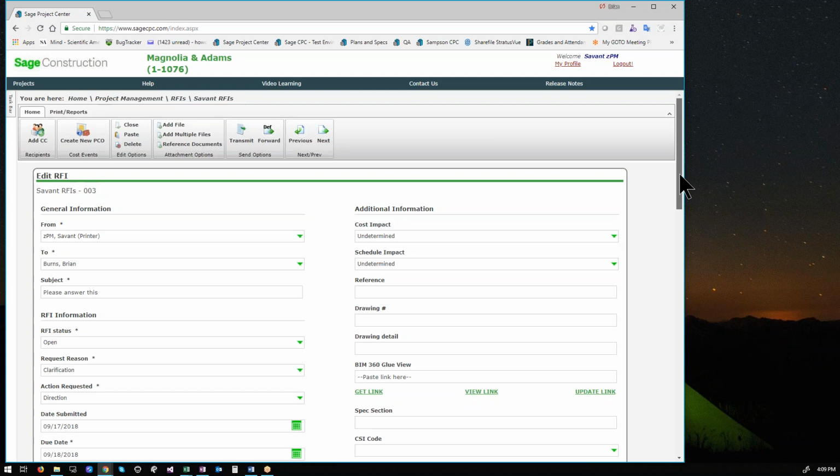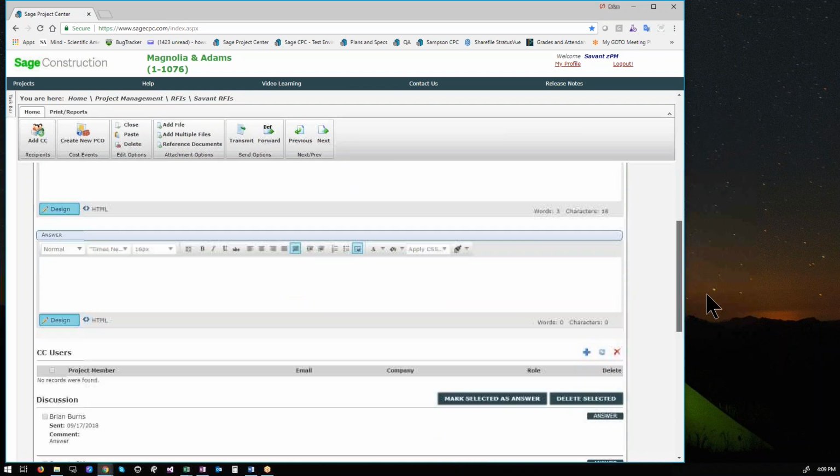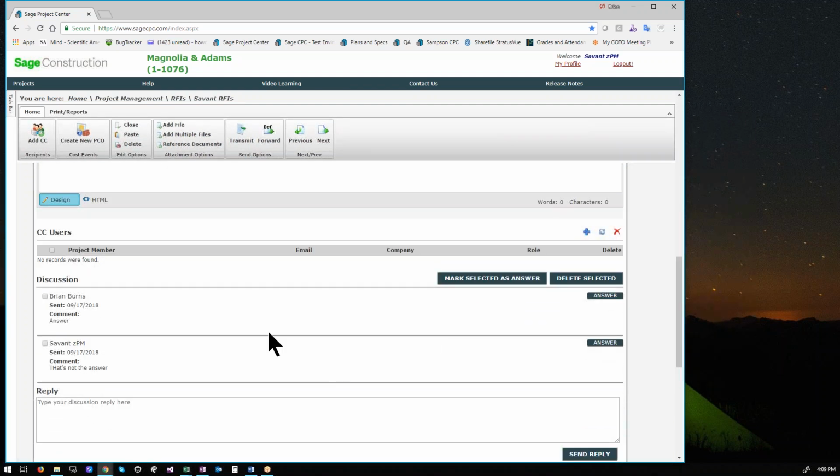So they have a further meeting that. Okay. The reason I'm going to wait for Brian is because I want three discussions, and the reason I want to show you that is because you can click multiples or you can click singular. While he's answering, if I just like one of the answers that are here, I can just click on answer, and that's going to close the RFI and post it in the answer box. If there are two or more, you can select which ones you want, then hit mark as selected, and that will bring both of these answers into there.